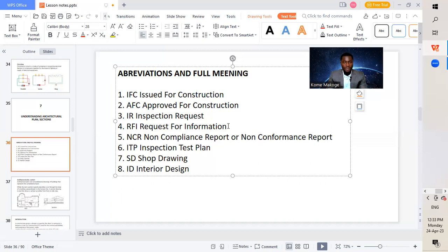So we will mention that in the RFI description, submit this to the client, and get approval if it is to be added to the project plan, so you get to proceed. Sometimes this can be added to variations if it was not mentioned in the project specification or in the project contract.